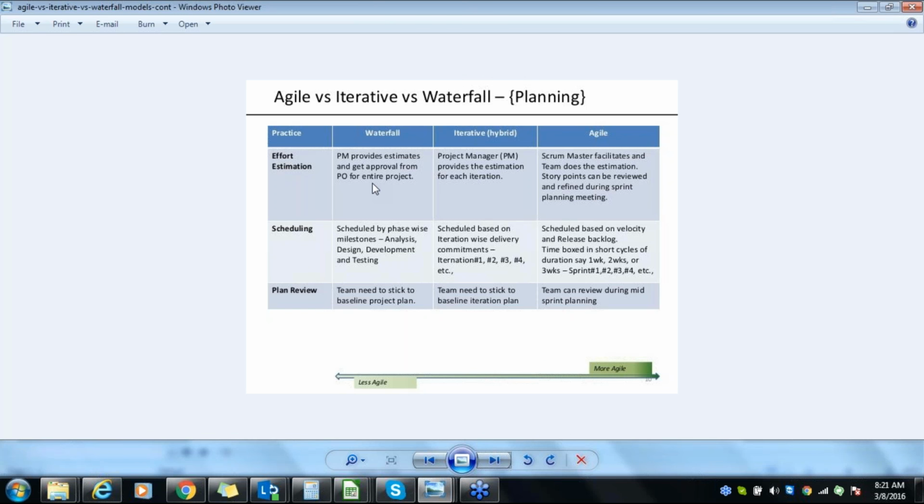Second, they have given a small budget, but while doing the requirement or in between the design phase, you felt this money is not enough, I want some more. Now again the PM has to go back, revisit his estimates, and get the approval. This is a very time-taking process.